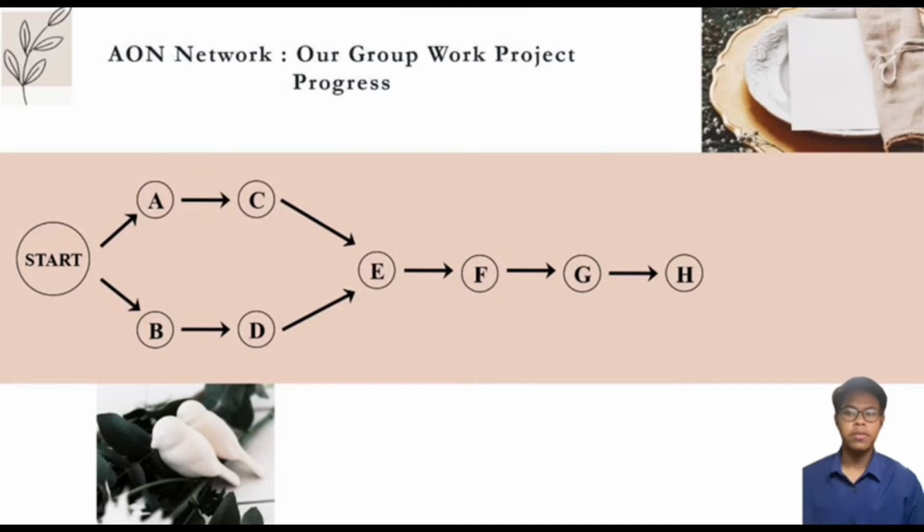And then activity C needs activity A to be completed before it can start. After that, activity D needs activity B to be completed before it can start. Next, activity E needs activities C and D to be completed before it can start. Moreover, activity F needs activity E, activity G needs activity F, and lastly, activity H needs activity G.